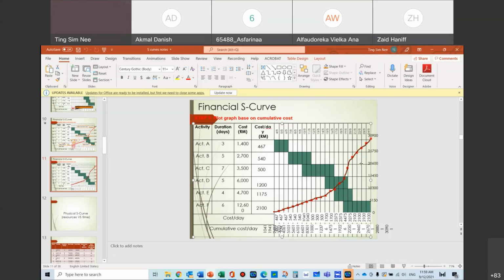But then when they see the picture, when you have three months ago they paid, they haven't been paying you this month, you know that there's going to be a negative because your expenses don't stop. Your work is ongoing every month. So if you don't go and chase money, next month they're still not paying you, your negative will become more negative, and then your bank account will drop.